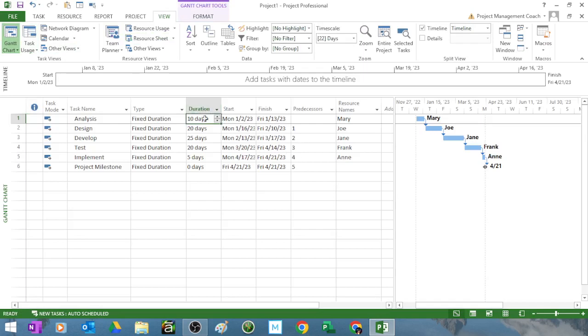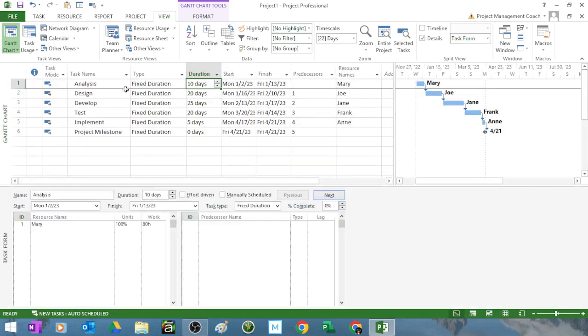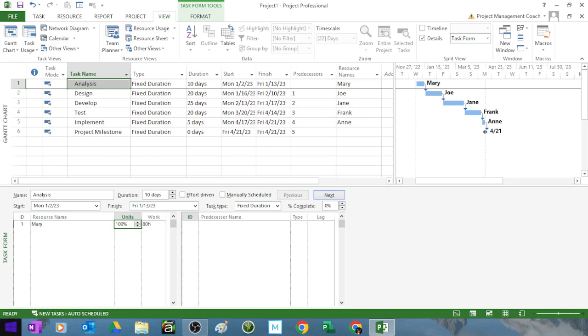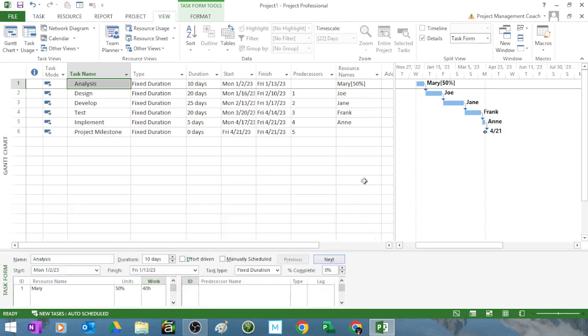We've told it it's going to take 10 days and Mary is going to be working a hundred percent of the time. Let me show you what that looks like below. Let's right click and do the split screen. And now you can see that Mary is working on this for a hundred percent of the time. So Microsoft Project says well if she's working a hundred percent of the time then that's going to be 80 hours. If this is not a true depiction of the effort involved, in other words the work, you got to tweak this. So let's say she's really working for 40 hours across 10 days. Type in a 50 percent. Okay it. And now it changes to 40. So you got to make sure you balance reality with what is in Microsoft Project.